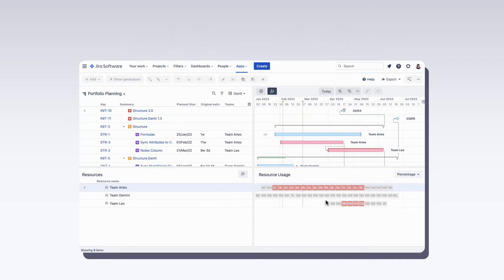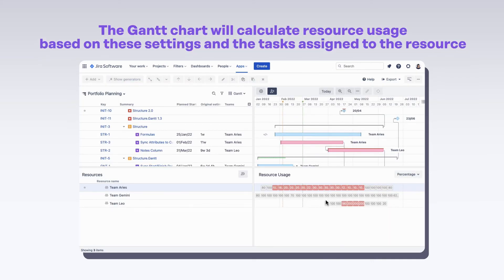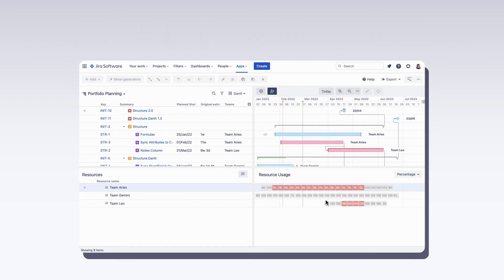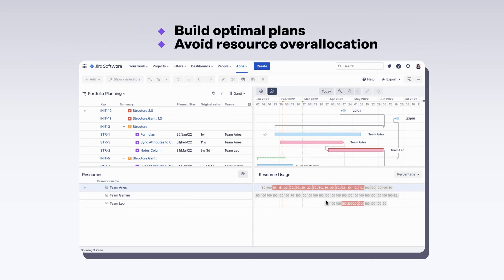The Gantt chart will calculate resource usage based on these settings and the tasks assigned to the resource. This will help you build optimal plans and avoid resource over allocation.